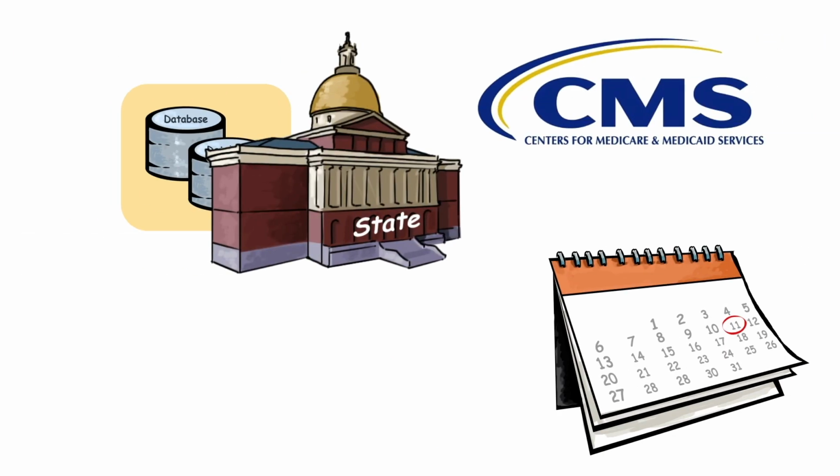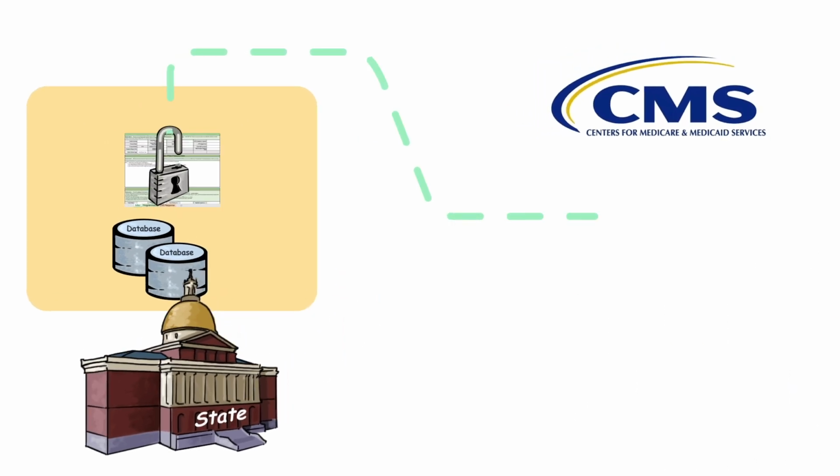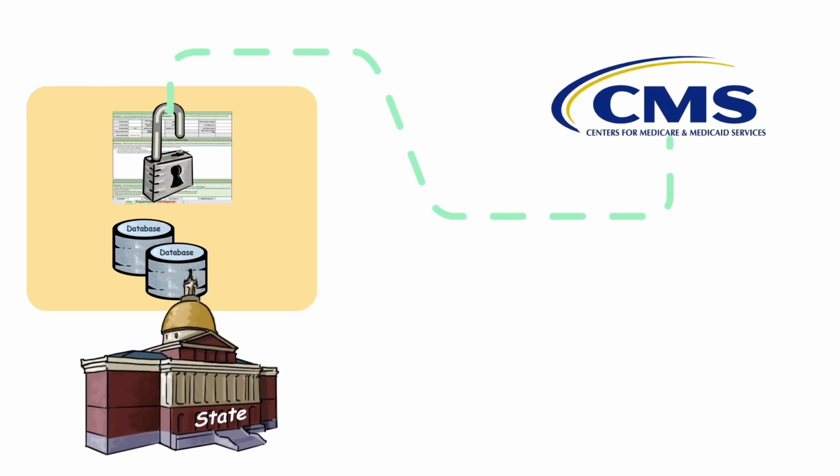Between 6 and 2 weeks before the milestone review, the state will need to grant CMS access to the evidence. States should talk to their ROs about gaining access to the CMS repository. Uploading artifacts to the CMS repository is the preferred method of submitting materials. However, the state may also grant CMS direct access to the state's evidence repository. It is critical that all HIPAA regulations are followed when submitting evidence that contains protected health or personally identifiable information,